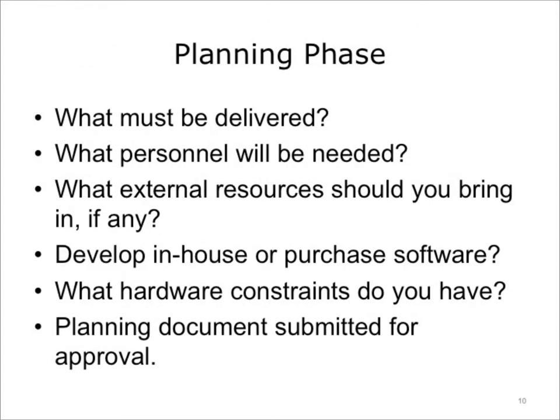During the planning phase, we determine who is doing what, when, and how, along with the personnel and other resources needed to complete the project. For instance, should we use existing personnel or hire consultants? We also determine what developmental resources will be required to create the specific software, whether to develop in-house software or buy it off the shelf, and what the deliverables are — such as completed software programming, documentation, user manual, training, and testing plans. A planning document is then submitted to management for approval.